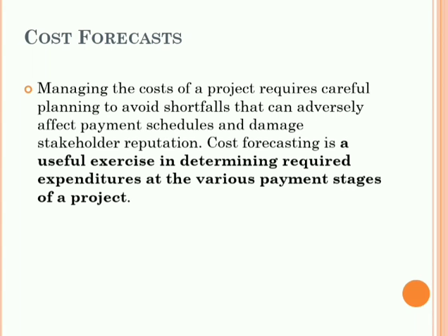The cost forecast will provide answers on the project's financial performance at completion and time phasing of financial parameters: revenue, cost, profit, cash, etc. It also covers the risks and opportunities in execution and their potential impacts to the project financial performance. The challenges in the cost forecast of live projects are different from those in the cost estimating during the different tendering phases.